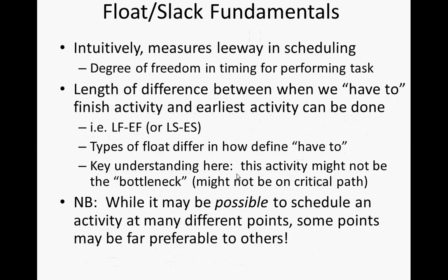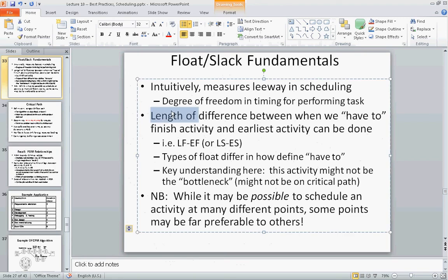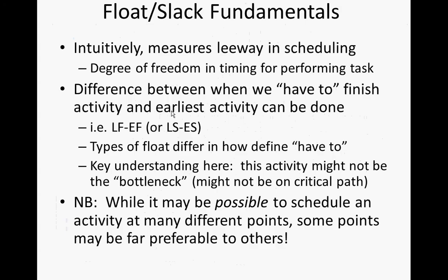Okay, so this notion of slack or float measures leeway in scheduling. It's the degree of freedom that we have for scheduling. It's the difference between when we have to finish a given task to avoid delaying the schedule, and the earliest possible time.